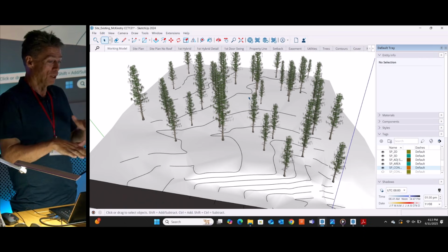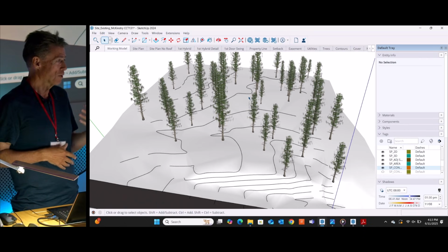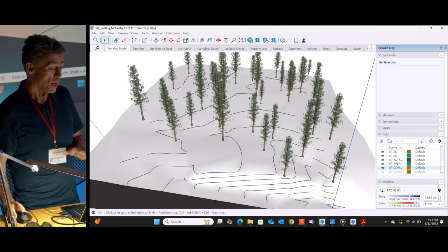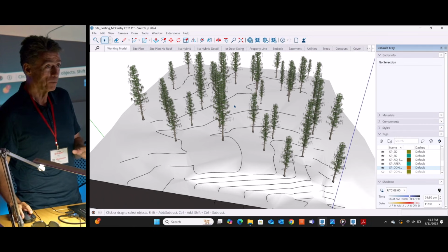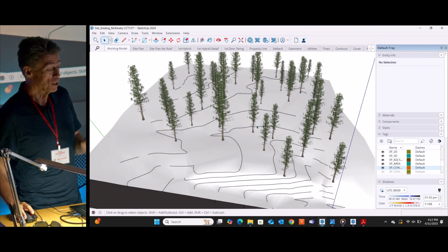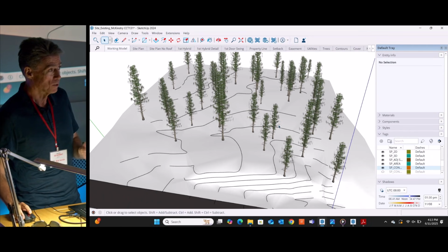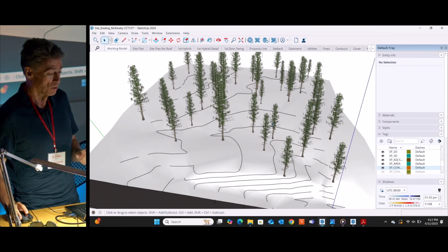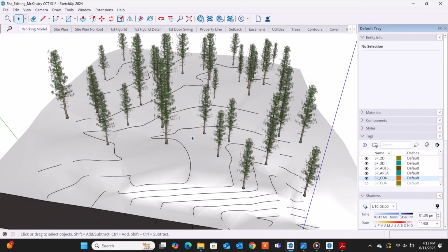And that really starts to impact construction costs for excavation, all of those things. And that's why it's really important to have a good idea of what is happening on the site. And to me, the most important aspect of any design project is dictated by the site. It's not just its location, but topography, views, solar, all of those things.